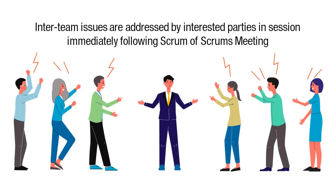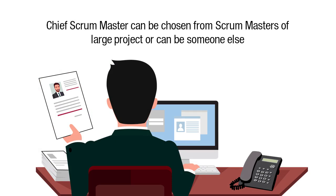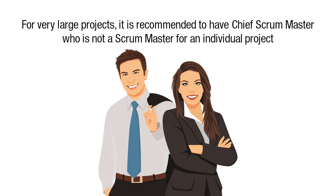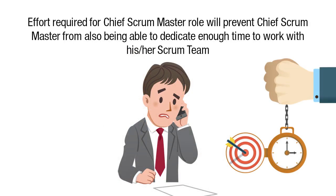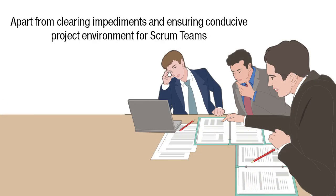Typically, any inter-team issues are addressed by the interested parties in a session immediately following the Scrum of Scrums meeting. The Chief Scrum Master facilitates the session. The Chief Scrum Master can be chosen from the Scrum masters of the large project or can be someone else. For very large projects, it is recommended to have a Chief Scrum Master who is not also a Scrum master for an individual project, because the effort required for the Chief Scrum Master role will prevent the Chief Scrum Master from also being able to dedicate enough time to work with his or her Scrum team. In either case, the Chief Scrum Master should have enough Scrum experience to be able to foster collaboration and to help and coach others with the implementation of Scrum for a smooth delivery of the project's products.